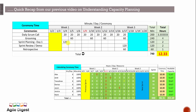Depending on which day you do sprint planning, you calculate it accordingly. Sprint review or demonstration takes about two hours, and the retrospective on the last day also takes close to two hours. In total, we are spending close to 12.33 hours on all these ceremonies. You can calculate based on all the meetings your team spends time on.